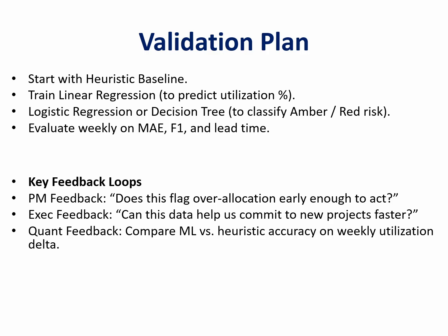And then the lead time: the time between when the model first flags the risk and when the issue actually materializes, before the buffer or slip occurs. More days of lead time is obviously going to be better, so people like myself can intervene earlier.